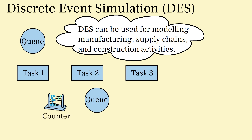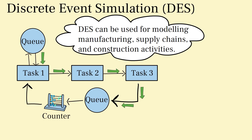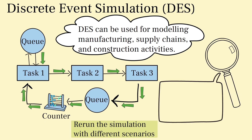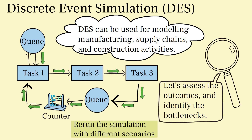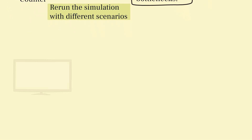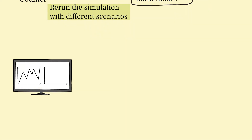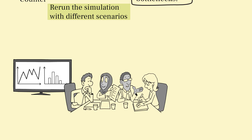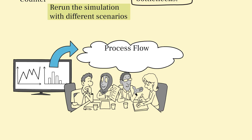In discrete event simulation, we break the project down into individual events or activities and define their logical relationships. By simulating the timing and interactions of these events, we can evaluate different scenarios and identify potential bottlenecks, resource constraints, or scheduling issues. By examining the simulation results, we gain insights into the project's flow, resource utilization, and potential risks.